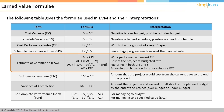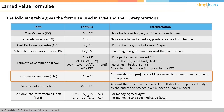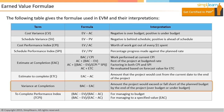Estimate to complete (ETC) is the cost of the project from this point to the end, calculated by subtracting the actual cost from the estimate at completion. Variance at completion (VAC) is calculated by subtracting the estimate at completion from the budget at completion, indicating whether the project is over or under budget at the end.